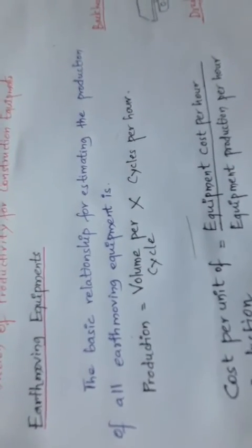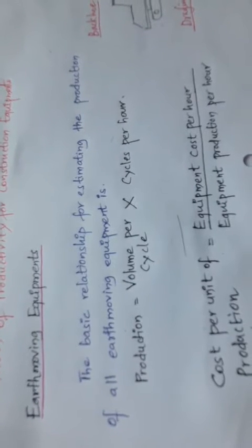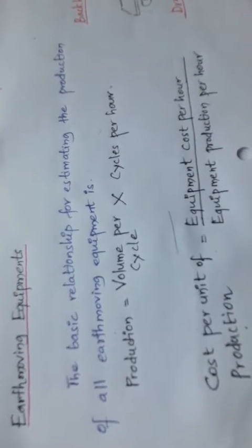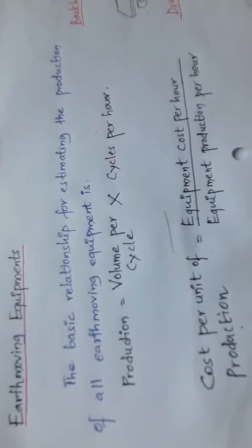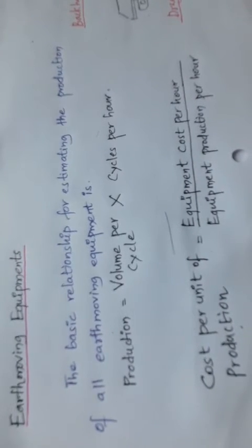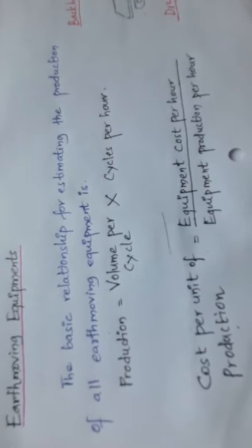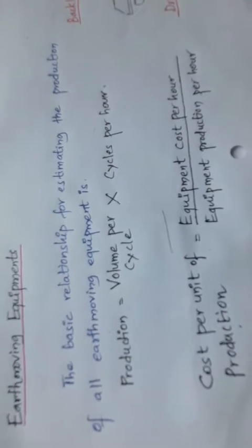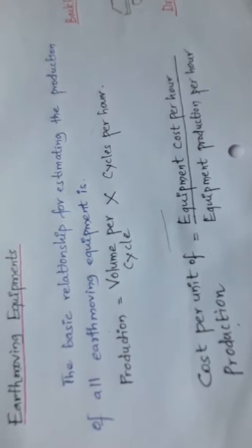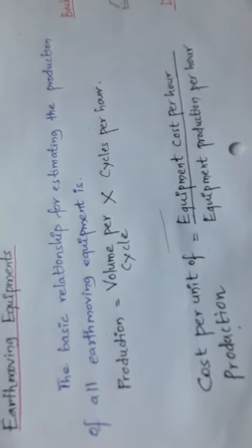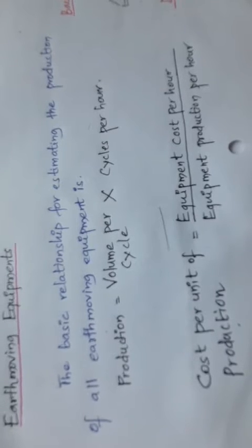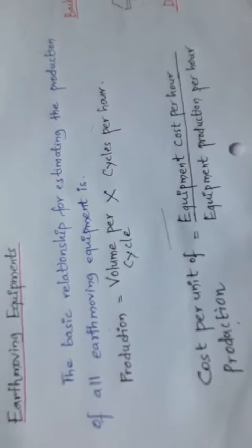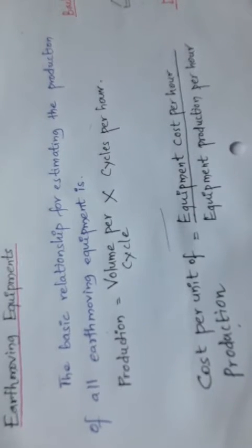Earth moving equipment may include site preparation like excavation, embankment construction, backfilling, dredging, and, if you come to highways, preparation of base course, subbase, subgrade, compaction and road surfacing. The type of equipment used and the environmental conditions will affect the man and machine hours required to complete a given amount of work.